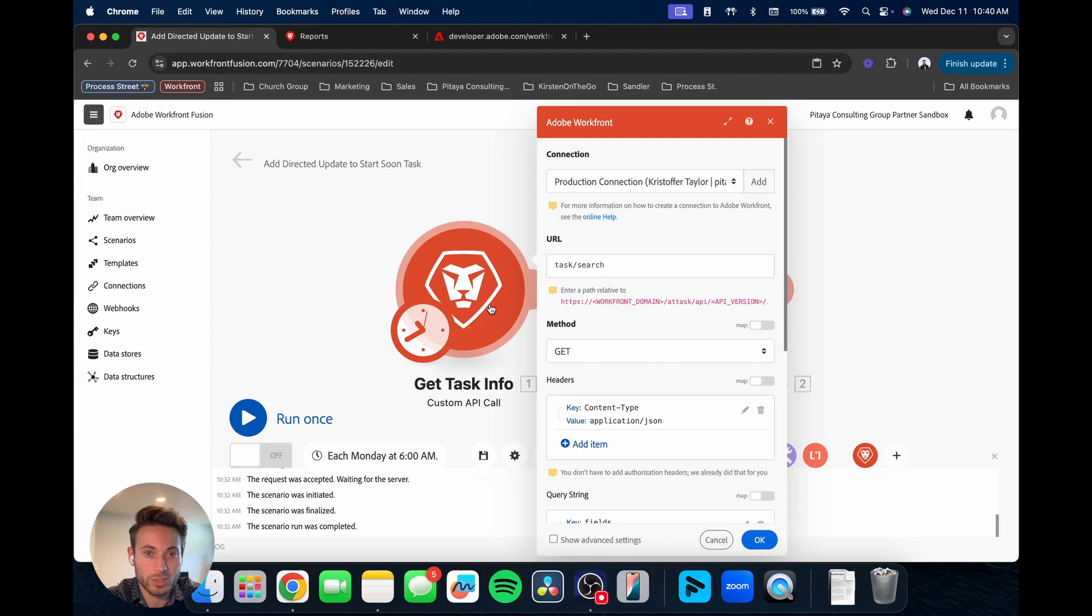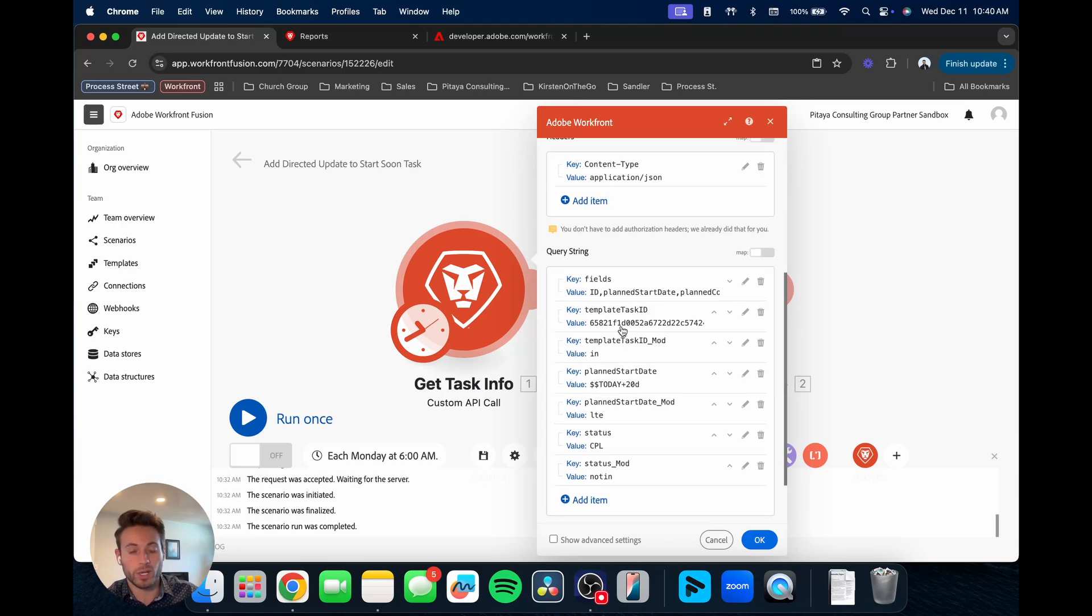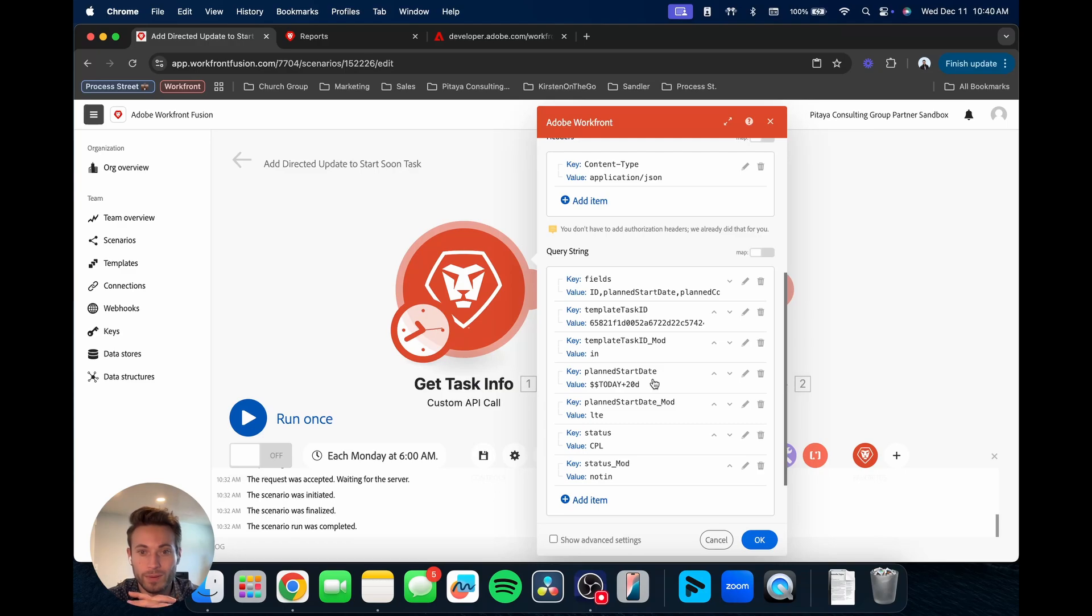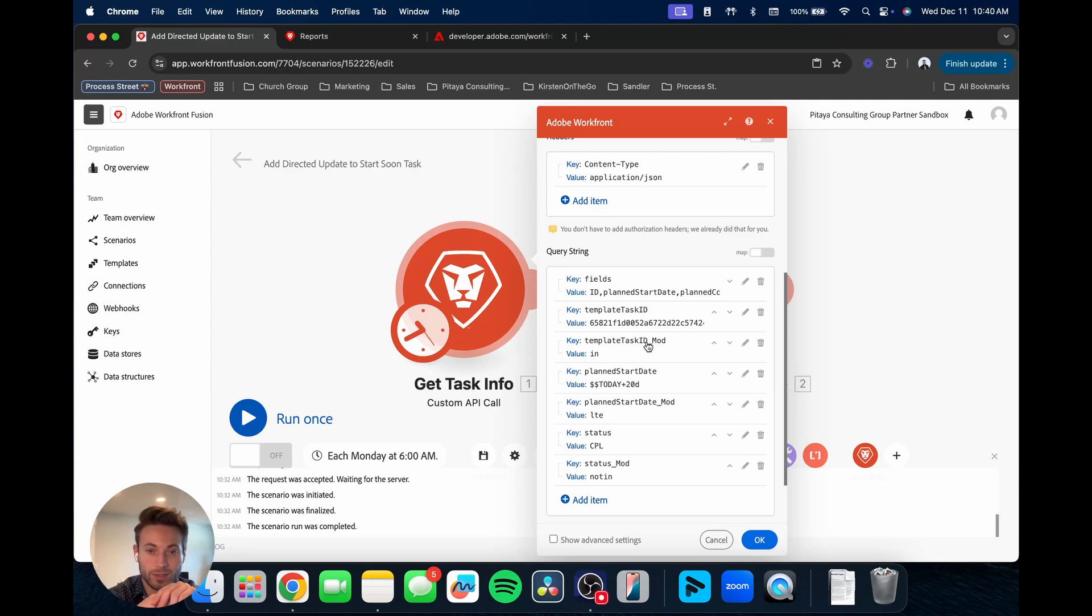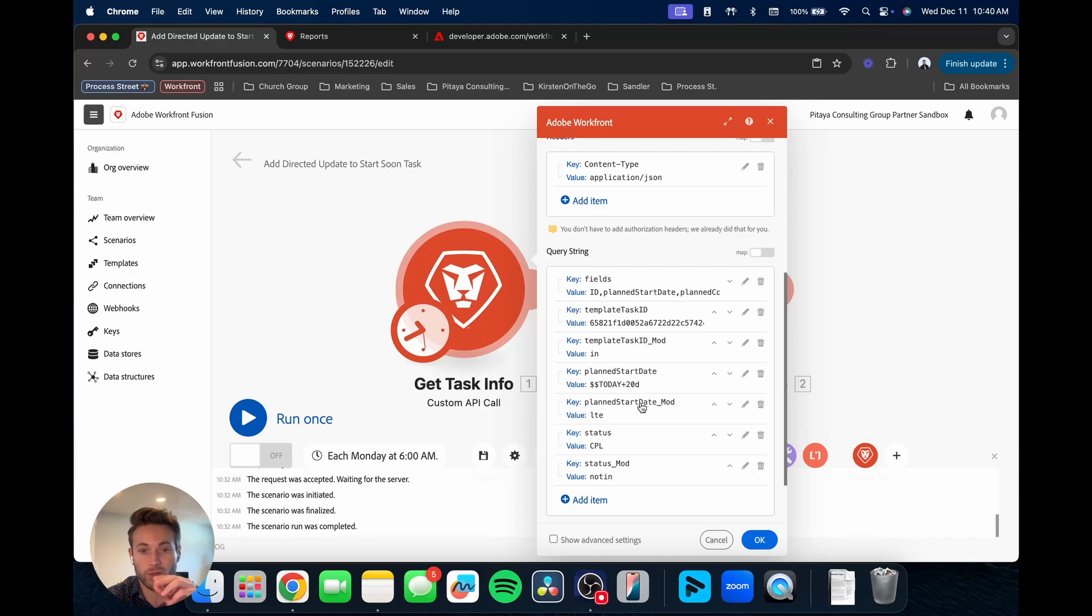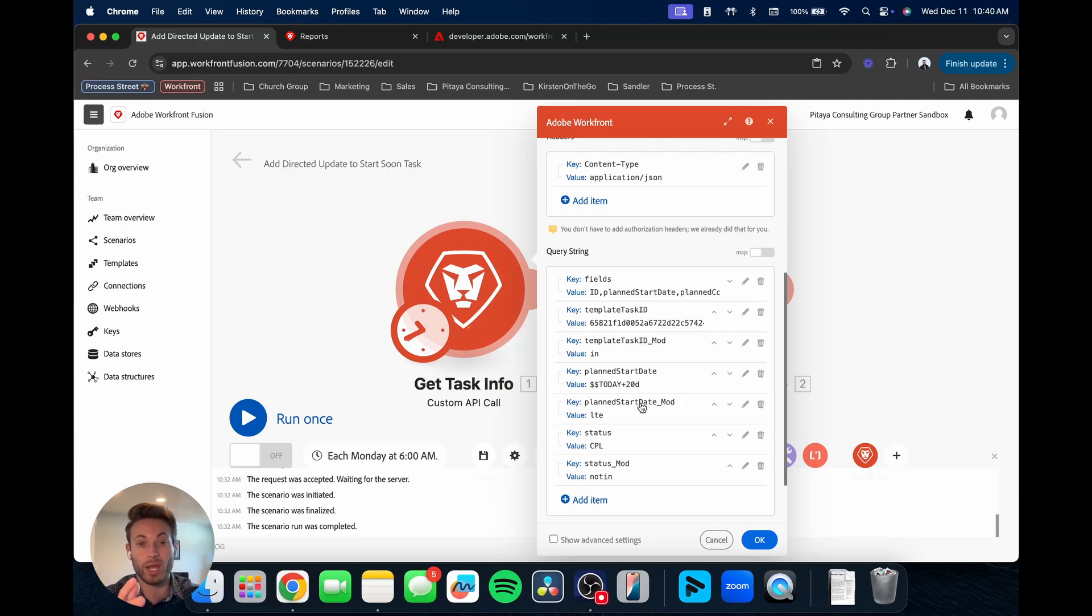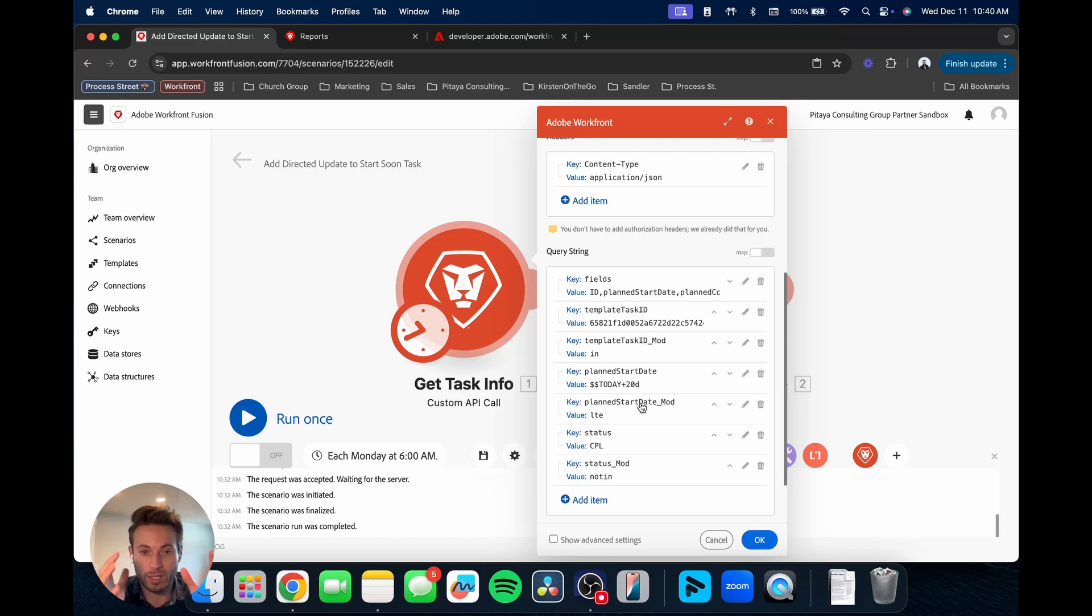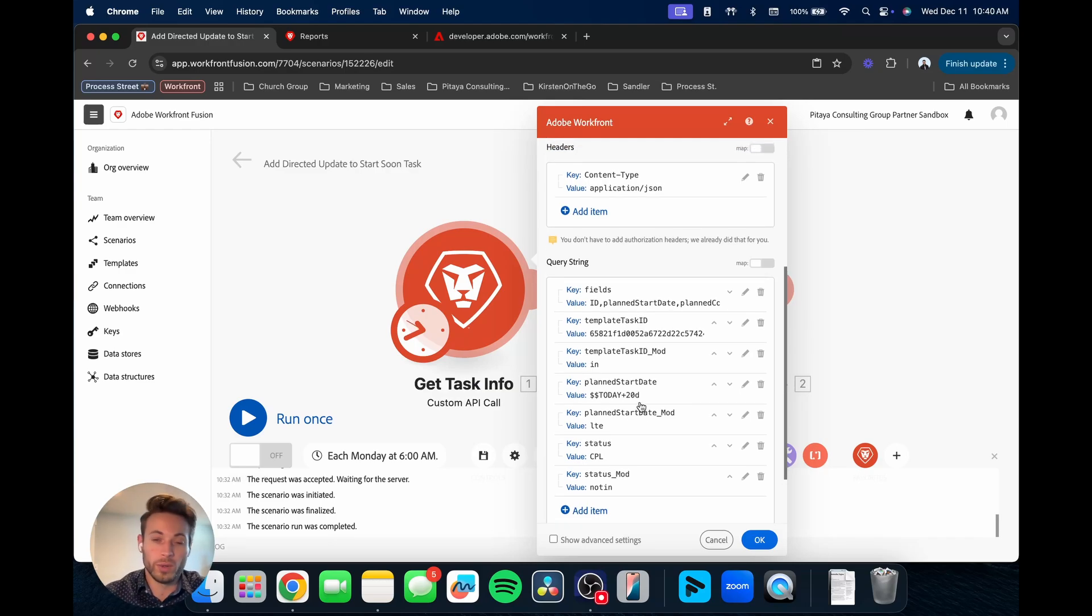And then look at the text mode of that report to help you understand how is it written, and then pull that into your Fusion. So using this idea, imagine if we're starting from scratch, I haven't built this yet. I know conceptually what I'm trying to do. I'm trying to filter and bring in the task information for tasks that meet this template task ID, that are going to have a planned start date that is within the next month or less, and also that the status is not complete.